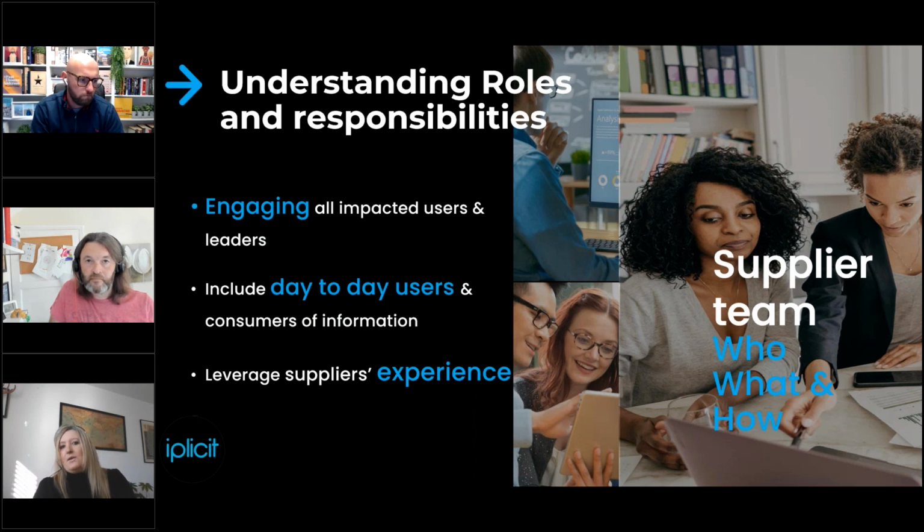Is this slipping? What do we need to do? Here's an update from our side. So we spend the first 10 to 15 minutes of all of the sessions actually just running through that action plan, so that everybody is clear about the status of things. And it gives an opportunity on both sides to say, do you know what, I'm going to struggle to do that. Can we move that back? And then talking about any impact, if anything.